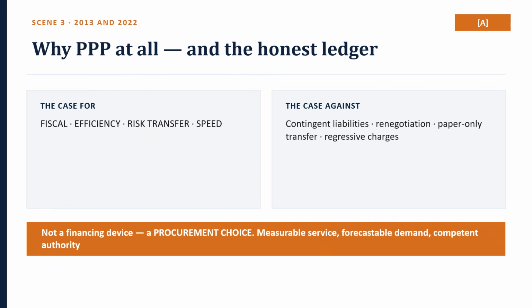The BOT model concession agreement predates the standard asset cycle, the arbitration backlog, and the entry of institutional capital into Indian roads. It was written for a market that no longer exists. So rewriting BOT, HAM, and EPC together is an admission worth stating plainly. The problem was never the choice of model, it was the allocation of risk written into the standard document that each model uses. A concession agreement is a contract about risk, and India is now redrafting the contract rather than switching between models.